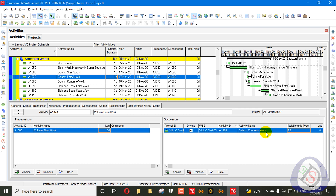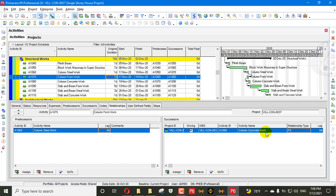I have a different concept for that. We can freeze our start and finish dates by constraints or anything else — that doesn't mean this activity is dangling. The challenge is creating a well-defined and logically connected schedule with no missing logic. If an activity lacks either a predecessor or successor, it is a missing logic — hence dangling logic — but this rule alone is not adequate to eliminate all dangling activities.